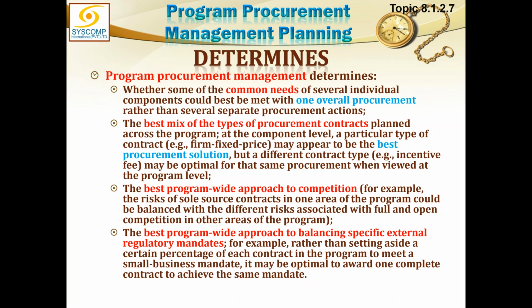So rather than having small little contract being awarded to 20 different contractors, maybe you can go for a blanket contract of all the 20 things being given to one person, one contractor who will have the expertise of all those 20. They may join hands together, and contract can be handed over to a single party.